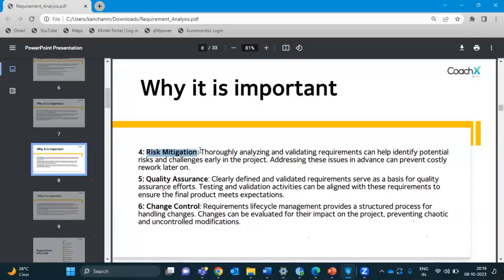So what I will do is start requesting the integration team to get all my data integrated with this new tool. So that could be one of the risks. There could also be a resource risk. Your project requires some expertise in maybe NLP or AI, and you currently do not have that resource.